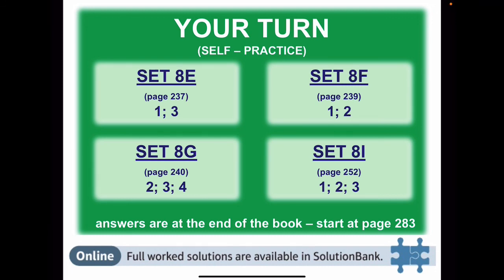The tricky part might be in set I, where you will be asked to not only create a Cascade chart, but also the schedule, and sometimes recreate the schedule if you do not have enough workers available. If the number of workers that you have available is lower than the lower bound, the minimum number of workers required for the project to be completed on time.